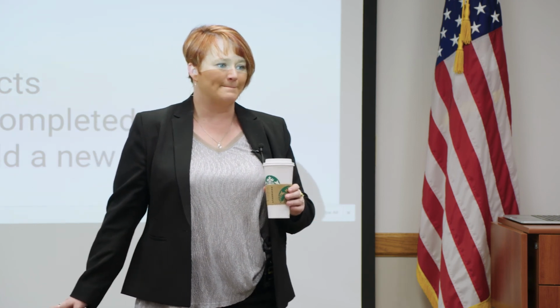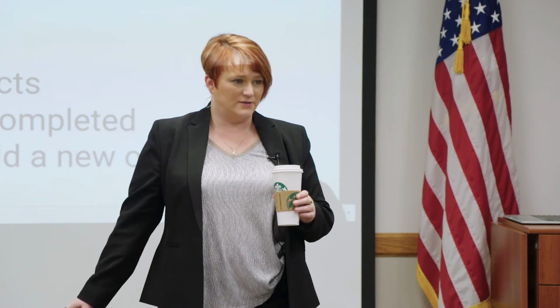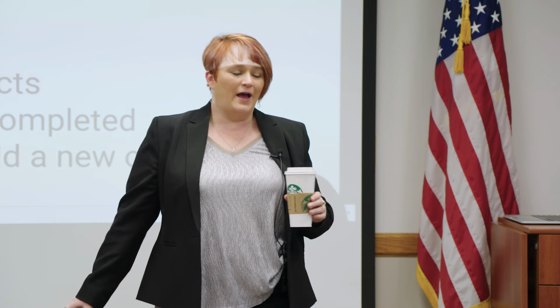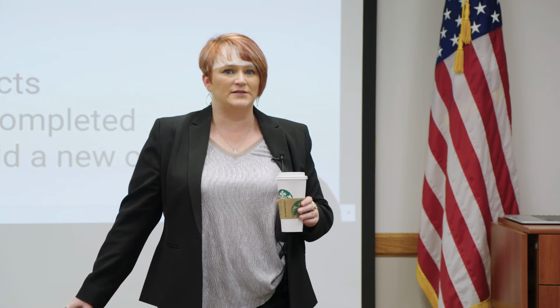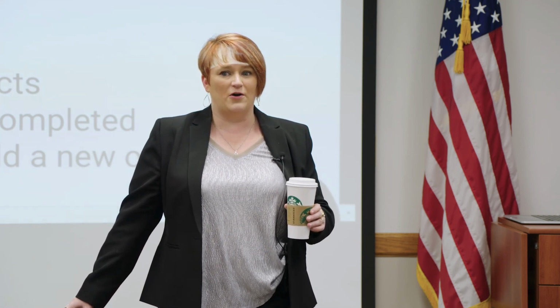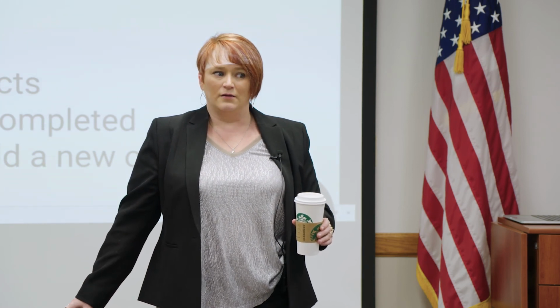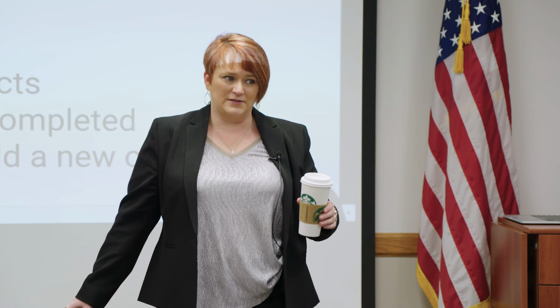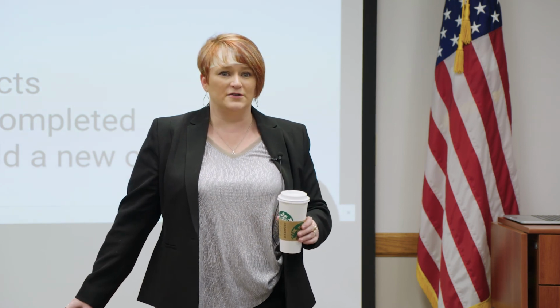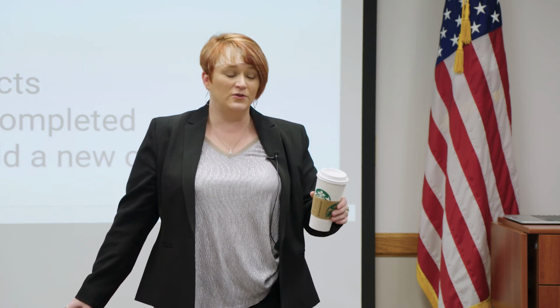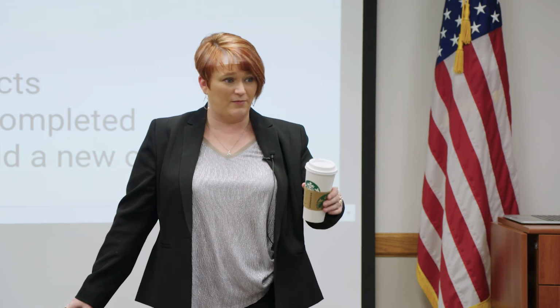ISP is a contract is up. Okay, so you are up with a contract. You can have a conversation with your ISP. The risk of running month to month is that there's no agreement on paper that says they will keep your pricing the same. No, I think we're going to have to take like a 3-year contract. Yeah, and that's been the case. So several years ago, so you need to get that agreement, that 3-year agreement that you're talking about.